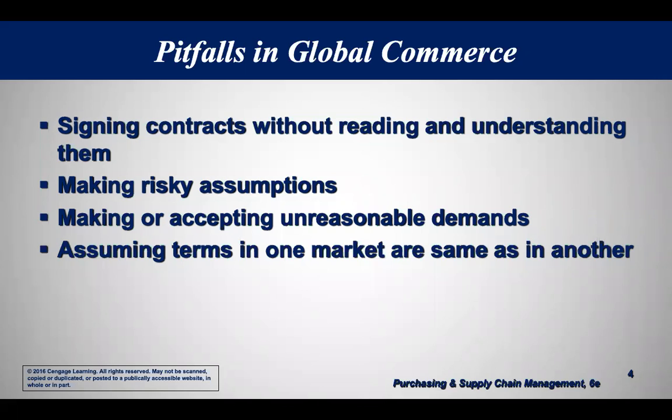And so if we're a buyer, sometimes the supplier will sign up anyway. They'll just sign it because they want the business. But because they have signed up to something they really would rather not have signed, or you have pushed too hard, then for the rest of the contract, while they're working on it, they're going to try to get some of their money back.